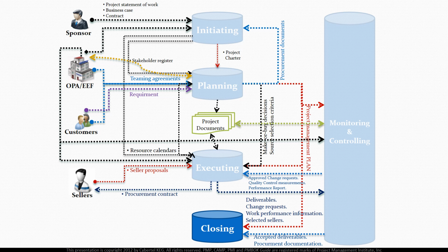But what if the project does not complete its objectives? Or cancelled, or has a critical situation that prevents us from continuing on this project? In this case, we should make a formal premature closure of the project. Premature closure? Yes, prematurely closed projects are those projects which cannot be formally closed. For example, in case of claims, termination clauses, etc.